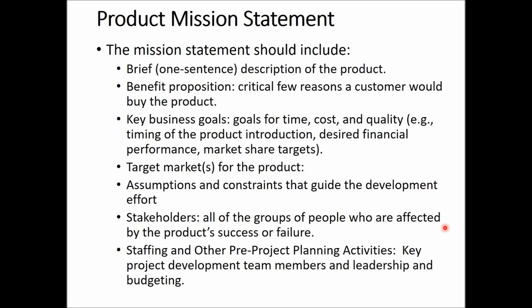It starts with a brief description of the project and benefit proposition, what kind of benefits the customers would get if this product is used, and from the corporate side, the key business goals that you're trying to achieve with this new product launch, and the target markets, and assumptions and constraints that you consider in developing the product, and the stakeholders, that is, everybody who has some influence or interaction with the product.